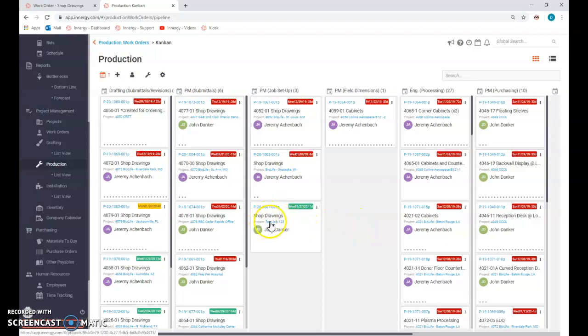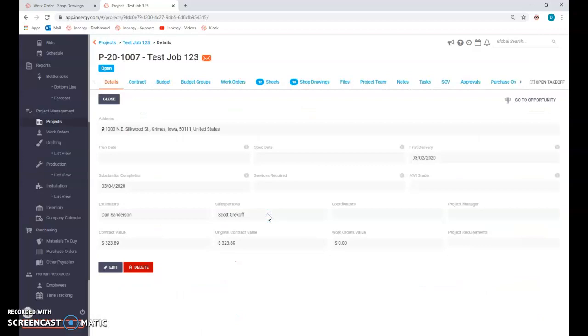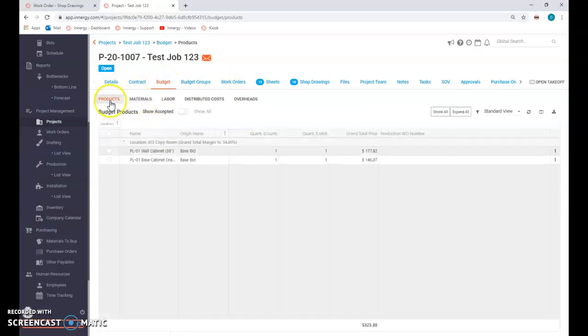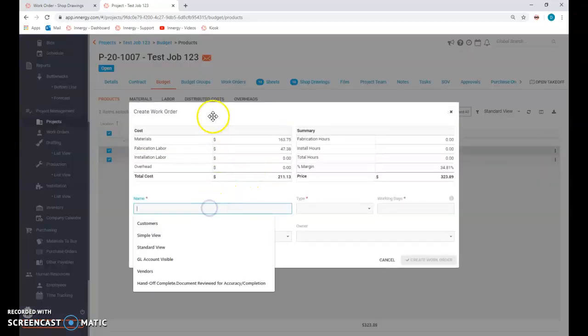So I'm Steve. I'm going to go ahead and click on this project, and I'm going to break them down into work orders. So in order to do that, I'm going to click on budget, and it will show me all of the products that were estimated by Dan, and hopefully we have a whole lot more information in here. Most likely we're going to produce them by room or type of product, so Steve will go through the items one by one and select them, and he'll say, well, this is going to go in a work order. So he'll go ahead and select them, click create work order,